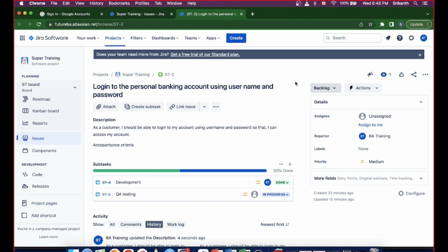Yeah, this is called backlog grooming. Whenever you have story cards and epics defined, if you are going for a Guidewire project, Guidewire will give you a set of user stories which the industry should follow, but based on your need you will add more stories or remove some stories from that set, because this is a standard product implementation.